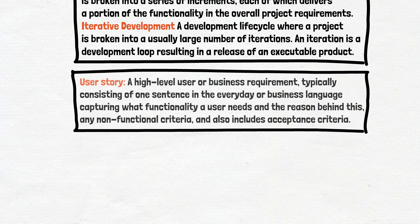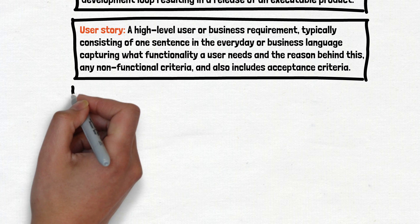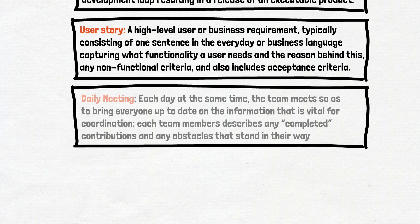The next concept is the user story — an example of documentation on agile projects, a form of lightweight use cases to define functionality rather than highly detailed requirement specifications. Very often people forget that they should include acceptance criteria; as a result, instead of having lightweight documentation, there is a lack of it.